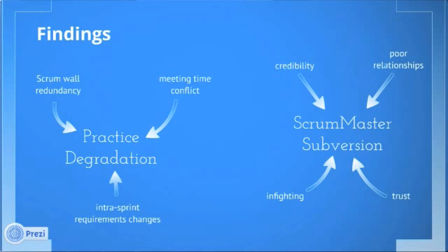Anyhow, so the first practice is the daily Scrum, right? The daily Scrum is about developing shared mental models and coordination. But the 11-hour time difference made this very difficult. They couldn't find any convenient time to have the Scrum. And so what happened was, over time, fewer and fewer people would be participating in the Scrum. And when they did manage to have a Scrum meeting, everybody sat down to use Skype. So they didn't have this pressure.